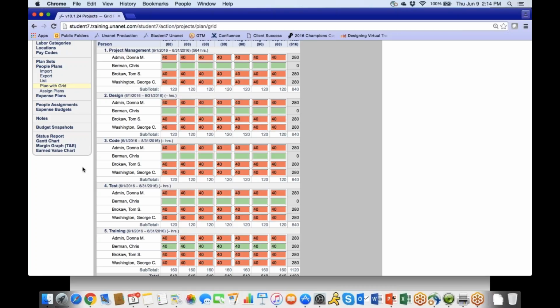Okay, so there are a couple of options there, I think. If you've got a total number of hours, and the total is the contract hours, you can see here I could have, instead of the 976, the 1920 hours for that contract value. You'd want to keep in mind that total and compare it to the total hours you planned here. Now I've way over planned those 960 hours, so I need to back off because I planned everybody all at once in the whole matrix.